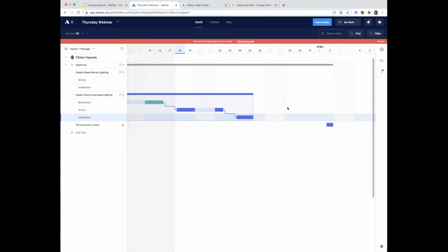For this hypothetical project, we're going to go through both a top-down and a bottom-up approach. To touch on what that means, a top-down approach is where your project might be importing high-level or parent tasks directly from your master schedule or long-term plan, which might live in P6 or something like Microsoft Project. If you're doing a bottom-up approach, it's a very similar process, apart from you don't import any of these tasks, you just create those high-level parent tasks in-app and then break them down.